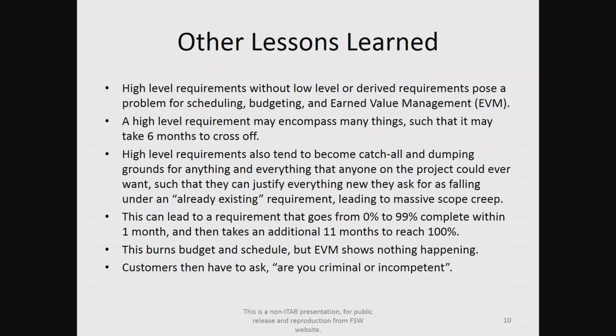And then some other lessons I've learned is that while high-level and low-level requirements each have their place, putting them in the wrong place can cause a bunch of problems. So for example, when high-level requirements go down into a system without anything derived from them, the high-level requirement can sometimes take many months to accomplish without anything appearing to be burning down, and this can be problematic from an earned value management (EVM) perspective.